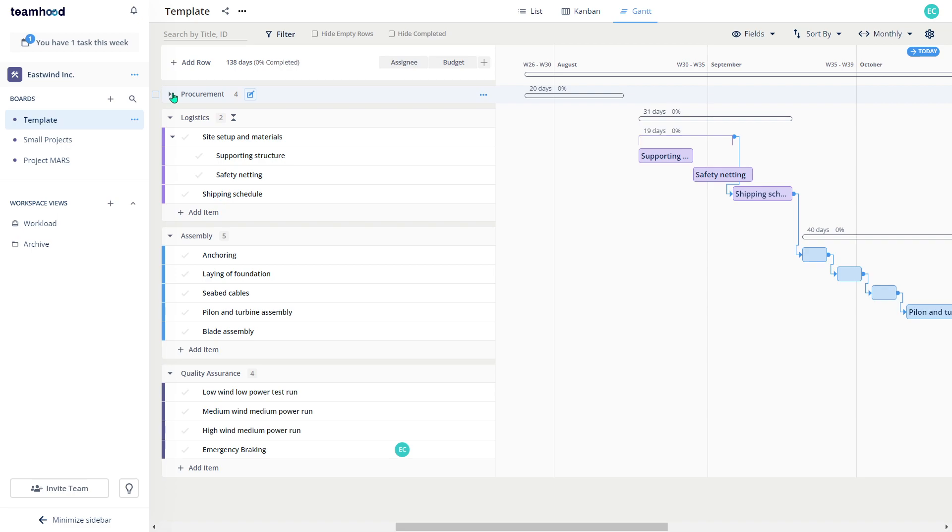And also, since I call this board intentionally a template, I can reuse it. I can standardize a project inside of my company, and once I need to start a new one, I just simply clone this board. And if it needs to be specific, I can remove one of those stages or more of them. So this gives me the building blocks of each project.